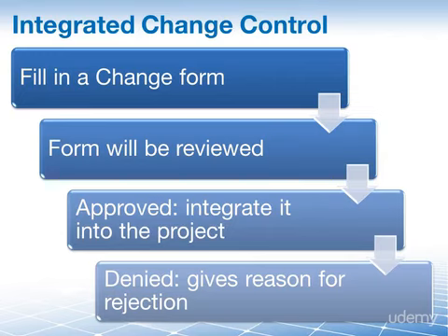For instance, a change in a law may result in added project complexity and increased cost for implementation, but your stakeholders may not be willing to pay this additional cost, and therefore the decision was made to cancel the project. That is why every change must be fed into the integrated change control system.